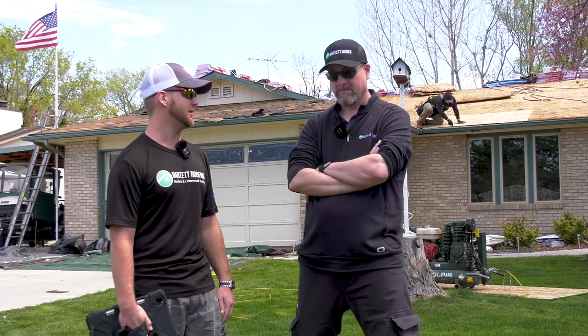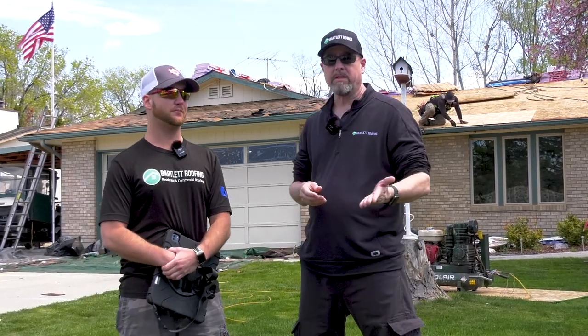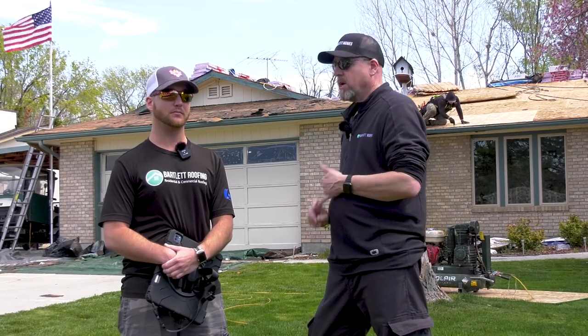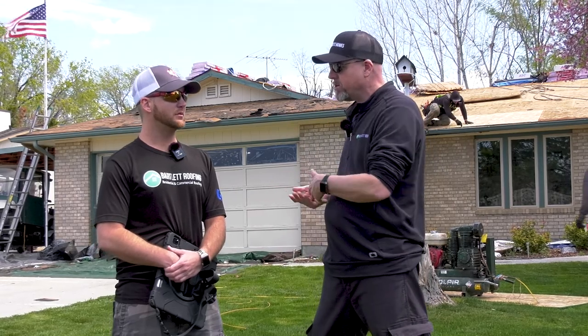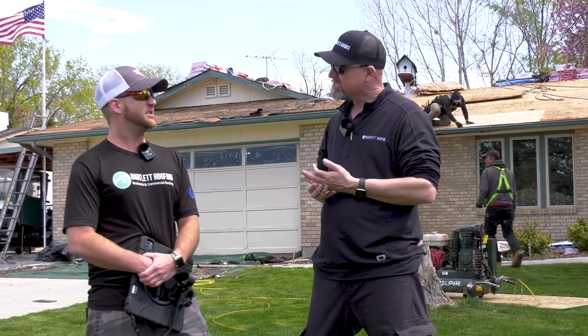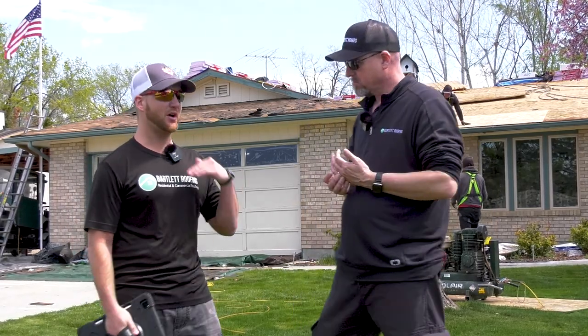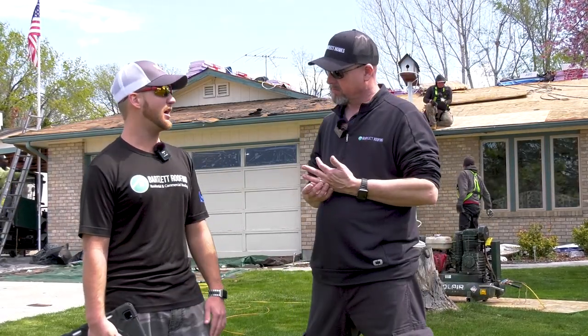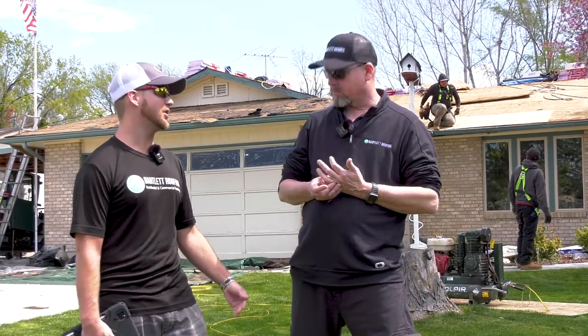So they'll go ahead and clean that roof completely off and then start installing the underlayment system. So if you know that you have PWI on a job, you need to be there not only when they do the clean off, but when they first start the dry-in, which is gonna be typically an hour after deck reveal, 2 hours? I would say typically probably around 11 to noon-ish. Our crews, they like to tear off really fast, get it all cleared off. Then they kind of start to clean up. They might grab lunch and then start installing.